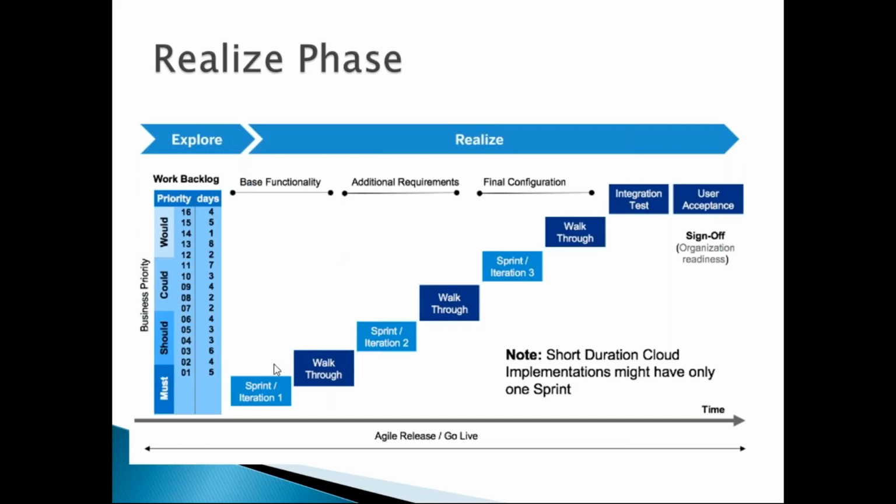So this is an example where the first few weeks on which we work, we call it the iteration period, and we go for the first walkthrough of the product. Then again, after a few more weeks of second iteration, we have the second round of walkthrough of the system. And again, finally, 1 more round of configurations. We complete the 100% configurations by this stage, iteration 3 period.